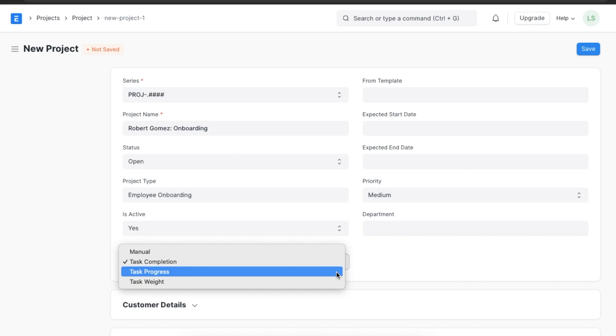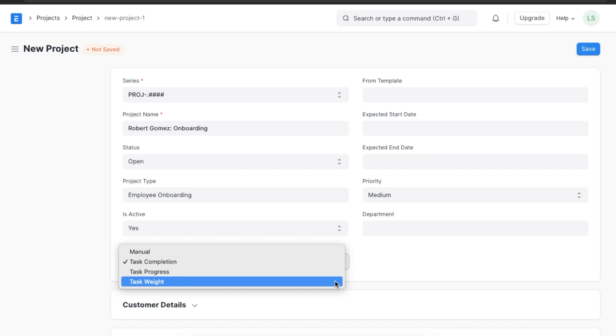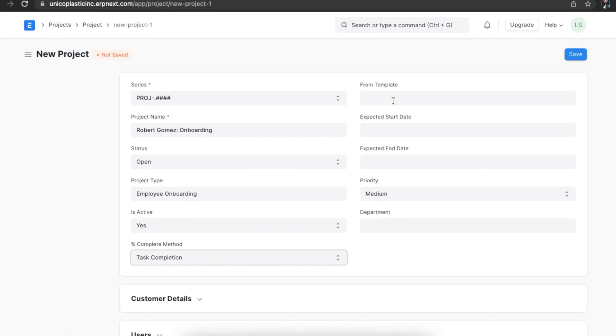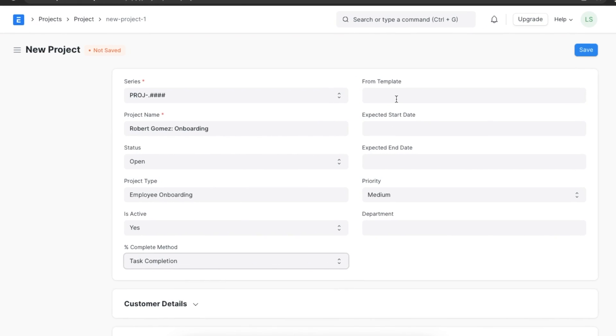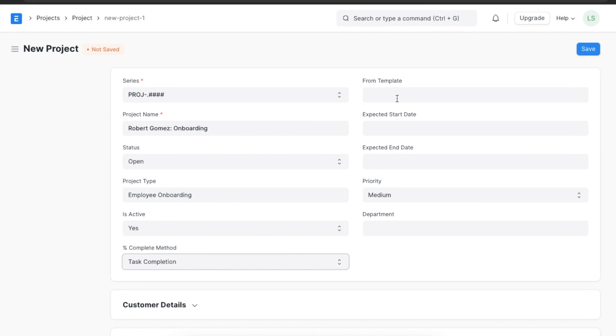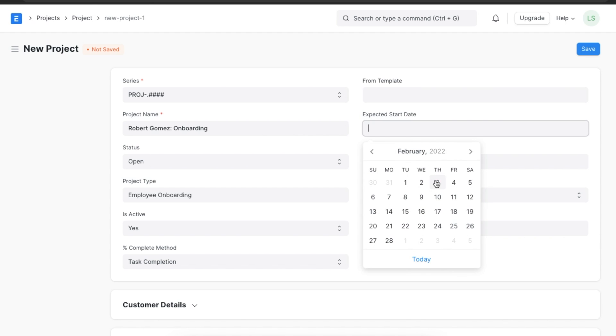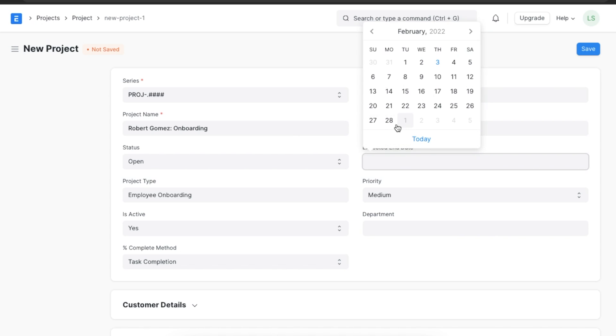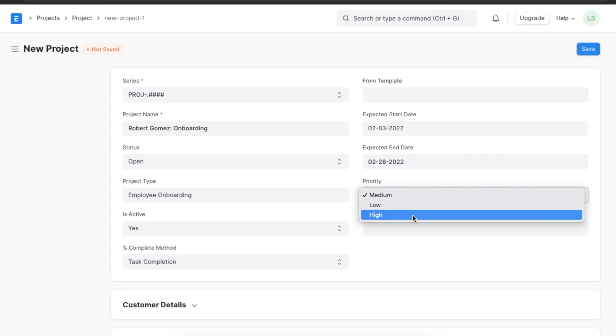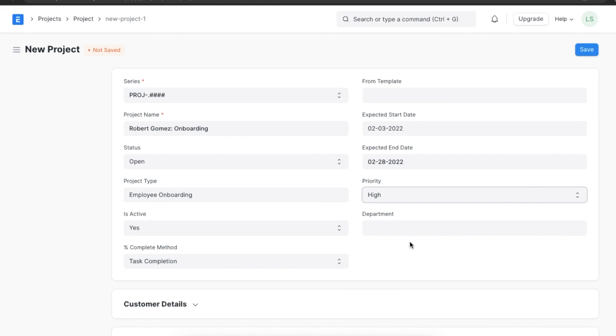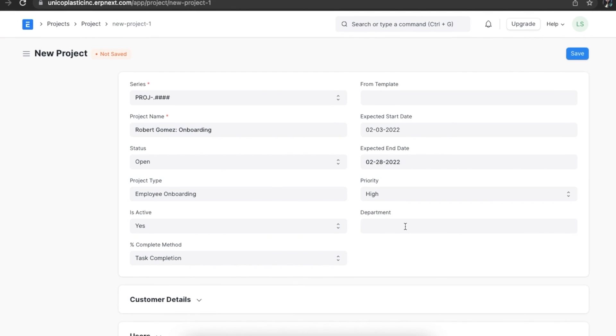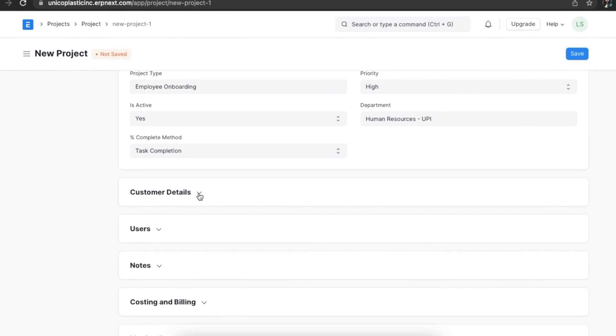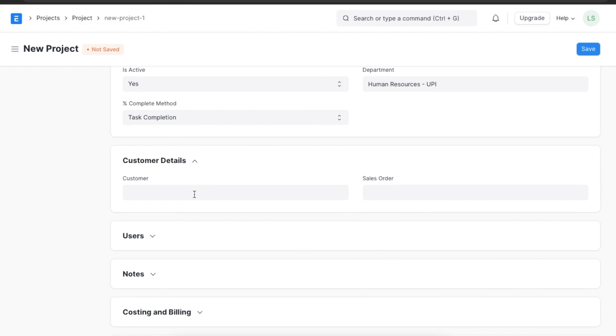If the tasks in the project do not have equal weightage and we would like to assign weightage to each task individually, we can set completion method to Task Weight. If we want to select a template for this project, we can select it here in the From Template field and tasks will be auto-created based on the template. Next, add an expected start and end date for our project. We can also set a priority level for this project. Let's assume the onboarding project is a high priority project, and we can select the department this project belongs to.